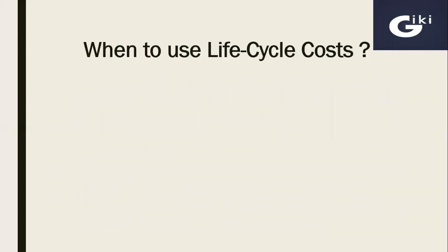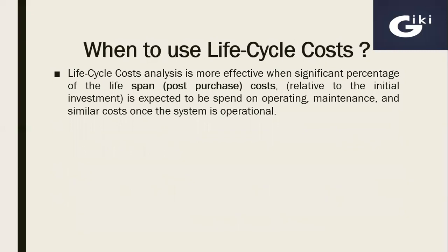When to use life cycle cost analysis? Life cycle cost analysis is more effective when a significant percentage of the lifespan costs relative to the initial investment is expected to be spent on operating, maintenance, and similar costs once the system is operational. In simple words, LCC is preferred when a significant amount is being spent on maintenance and operating expenditures as compared to the initial investment.